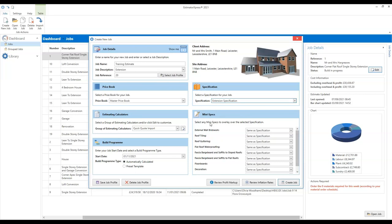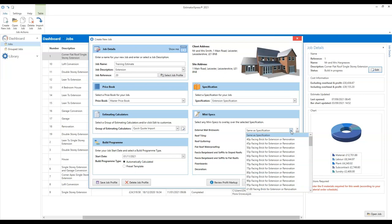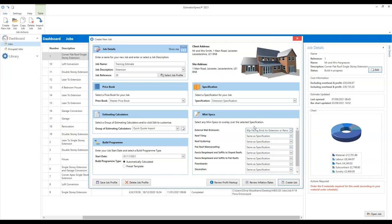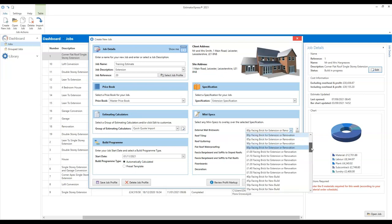The mini specs will further refine and tailor the extension specification you've selected. First of all, you can select a price allowance for the brickwork — you might say we're using a nib-stock brick at 80 pence per brick. That will obviously have a significant impact on your estimate versus using a £1.40 facing brick. Next, you can select the roof tiling system — pan tiles, plain tiles, slates. You might see the odd mini spec option in here that you haven't got; that's because I've set up some of my own mini specs, which is something you can do if you want to.